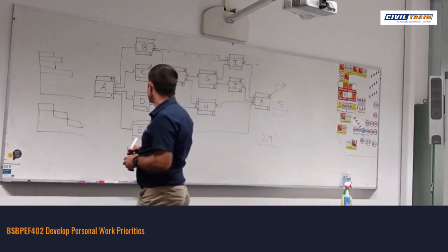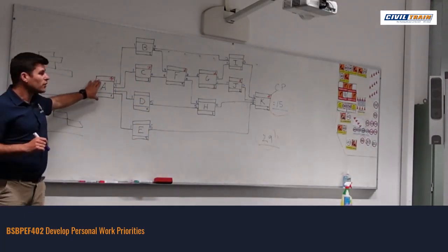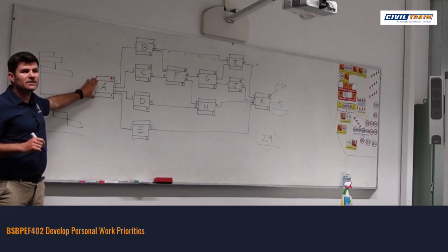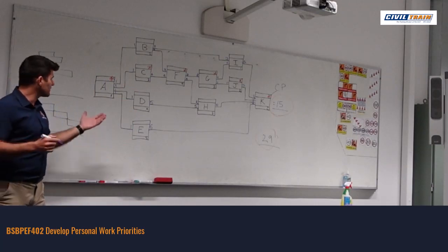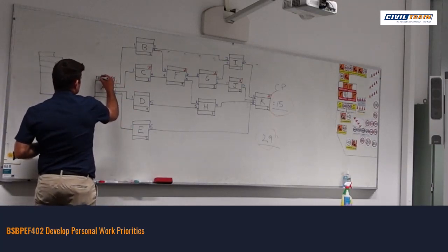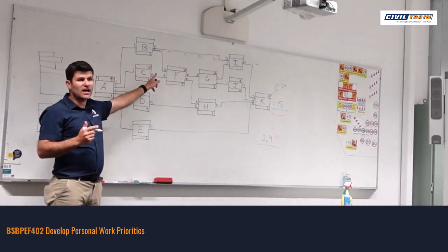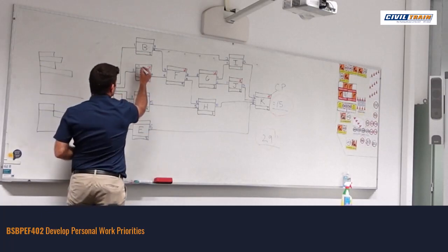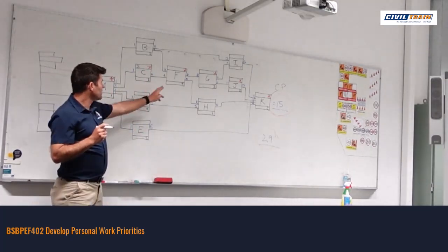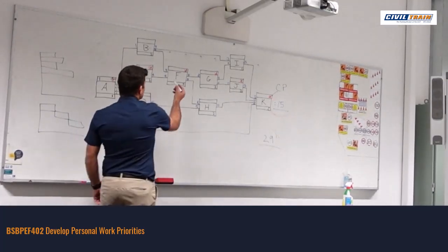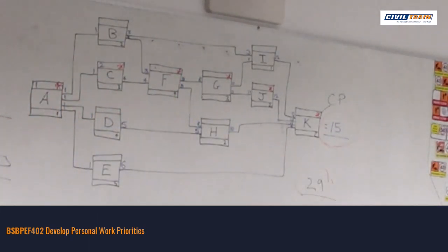This is where, if we go back to the original one, we number, following our critical path as closely as we can, until we've numbered all our task activities. So obviously we start here at number 1, and I'm going to follow the line, trying to get straight to the next star, my critical path, and I'll make this task 2. Okay? I want to make F 3. Is there anything stopping F from being completed?